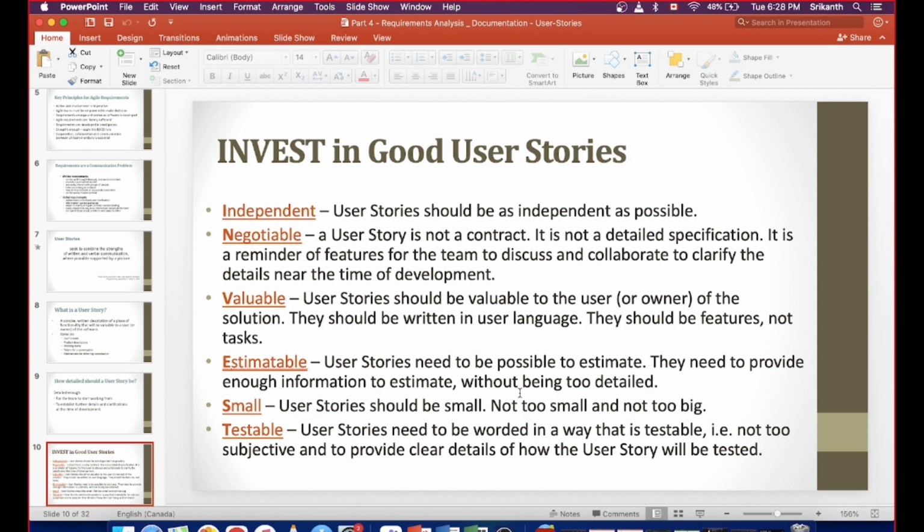So there are a total of 800 hours in the team, and these estimates should match the total workable hours in the team. They'll allocate that many hours to each and every story card. And if we are out of hours, then we won't be able to take any more story cards into that sprint. Anything which is already DOR done also will be pushed to the next sprint.